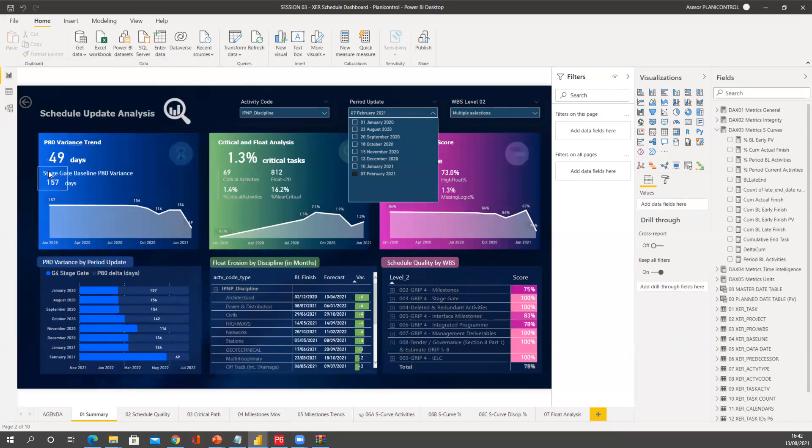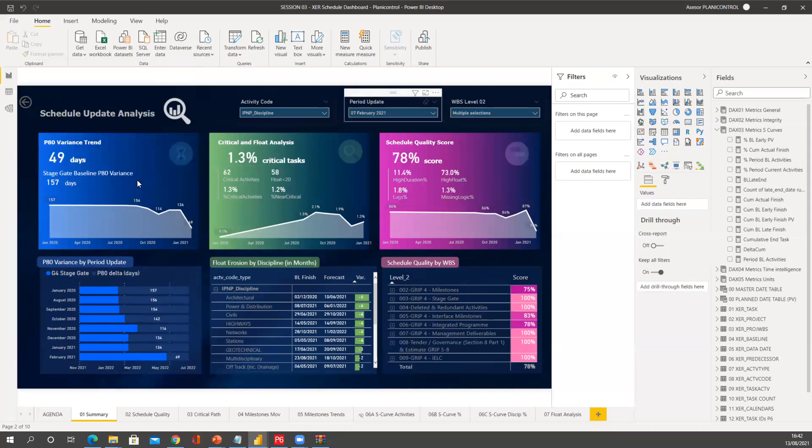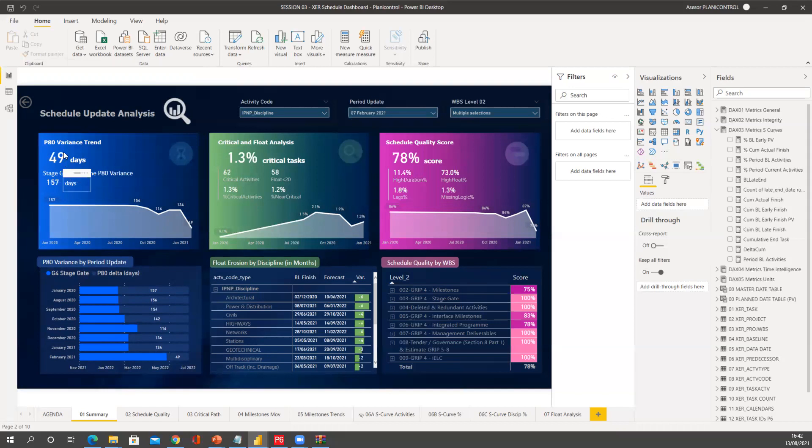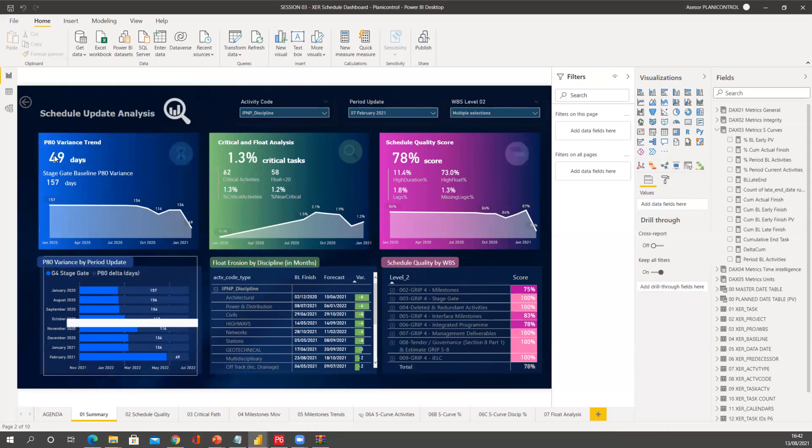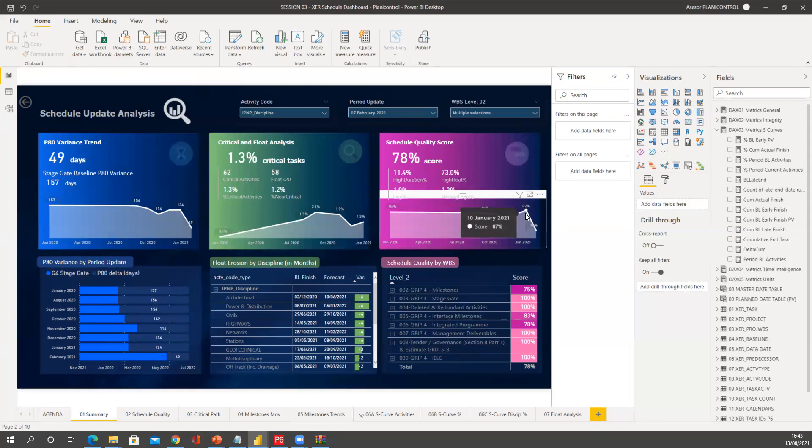So you see now this value is correlated to February. So I have 49 days buffer of time, and this is my terminal float comparing my deterministic day against my P80 that's coming from the risk. The schedule quality in January I didn't highlight, but it was quite good, standing at 87 percent.